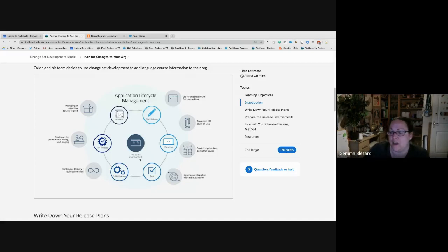And then it goes on to somebody building it. In an agile situation, you write user stories. And user stories typically look like, okay, as a salesperson, I want to be able to record the fact that somebody has made an inquiry so that I can follow up with them afterwards. That's a business requirement, and it's very business and people focused.